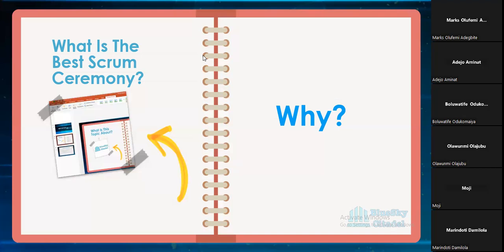You know, when Laomi was talking earlier on, she said because we're using Agile, Agile is all about agility, flexibility, being able to change. Those are some of the principles of Agile, okay? But at times, you are the one that faces the stakeholders and tells them, if you keep changing your requirements, there might be a possibility that we would not be able to deliver to timeline.